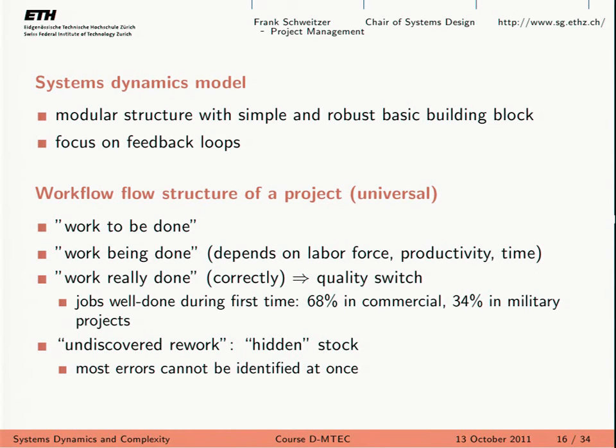And at the end, actually, I just noticed yesterday that somewhere in your notes it says that the shipbuilding company won a lawsuit. There was no lawsuit at the end. They settled outside of court. And they settled for $450 million out of 500, which is almost everything. Right? I found this out because I wanted to find the court cases.